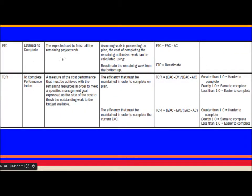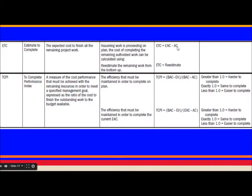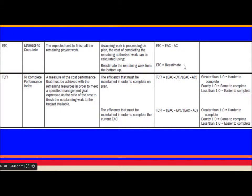Estimate to Complete (ETC) is the expected cost to finish all remaining project work. ETC = EAC − AC, assuming work is proceeding on plan. The cost of completing the remaining authorized work can also be calculated separately, or re-estimated from the bottom up.